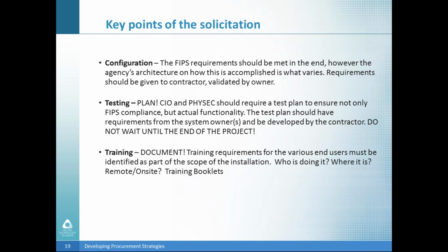Next, you should have a testing plan. This is really important because you've got your approved vendor with your approved products, but you want to make sure that the plan or how all the equipment's coming together is getting tested, and there should be a documented plan to come back and say, here's the steps that we took, here's the boxes that we checked, yes, everything works, and then you have that documentation for later if you need it for auditing purposes or to refer back to at a later date. Don't wait till the end of the project to do this. You should have the testing plan up front, and that's something that you should be working on with your vendor.